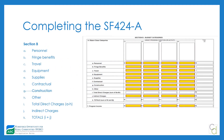Section B has nine cost categories you must use to budget your projects: personnel, fringe benefits, travel, equipment, supplies, contractual, construction (not applicable), other, and indirect. In line I, add the first eight cost categories together — everything but indirect. In line K, add total direct plus indirect to get your total federal request. All costs must be addressed in the budget narrative. Also note that program income generated must be used for program activities.